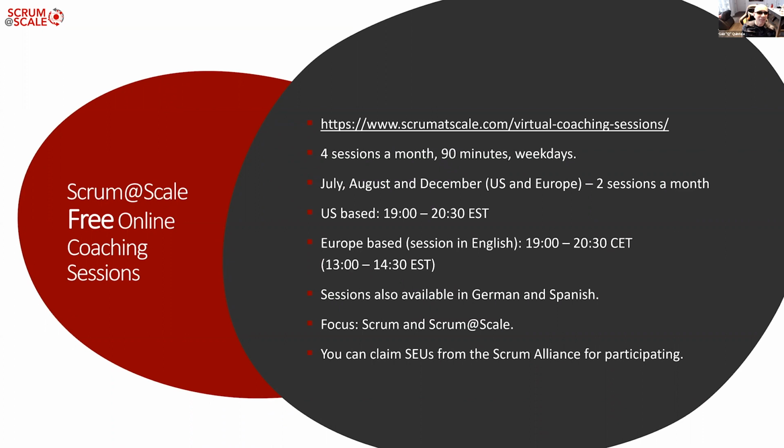Normally the impact map doesn't happen very often, because once you have the goals, it usually takes a little bit of time to accomplish them. I would say probably somewhere around quarterly, maybe even less than that. But impact maps don't happen every 2 weeks or so. I mean, I've never seen a case like that.